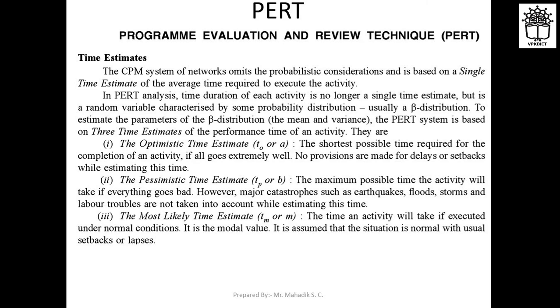The next is the pessimistic time estimate. This is the maximum possible time the activity will take if everything goes bad, right? However, major catastrophic failures such as earthquakes, floods, storms, and labor troubles are not taken into account while estimating this time.